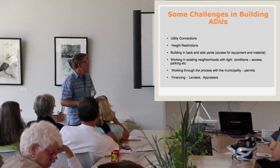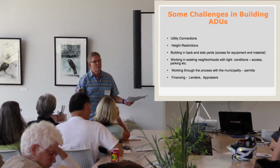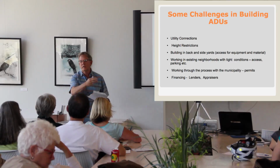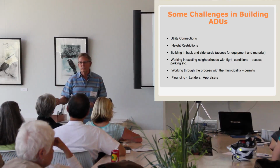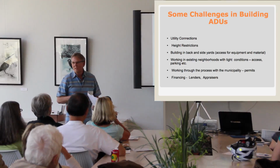And then, as I mentioned earlier, working through that process of getting the permits. I kind of breezed over that four to six weeks. There's a lot that goes on during that four to six weeks with me and the city, or with whoever's processing the permit in the city, back and forth, pushing it through different departments, answering questions, supplying more information. So it's a challenge, but it's something I do all the time, but it's something you need to be prepared for.